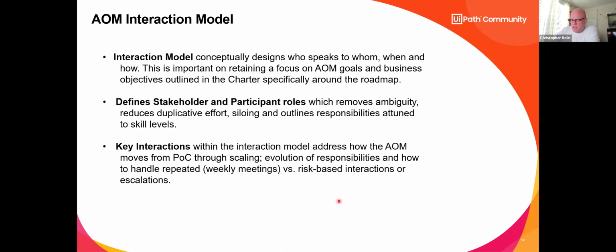When you're working in an organization or in the commercial sector, it's very important to set up a meeting cadence, a communication cadence. We will meet once a week on Thursday, and we'll update you on what we've got. If you want that to be a Scrum meeting, make sure that the organization wants that to be a Scrum meeting. If they want something separate, give them what they want. They're the ones that own the contract. They're the ones that own the product. So it's good to have that cadence established when you're setting expectations on the projects.